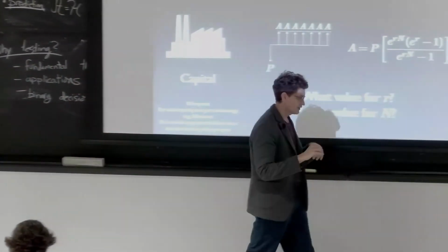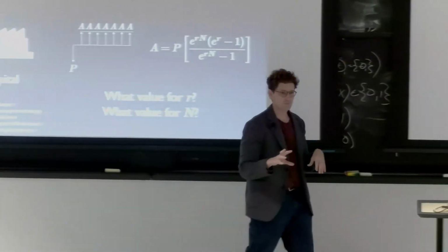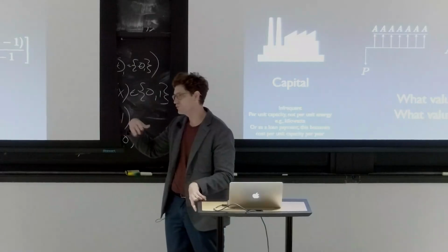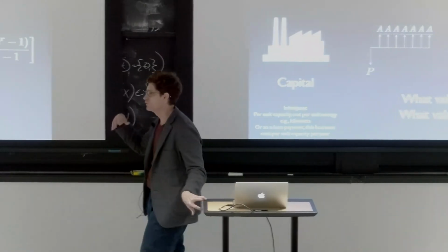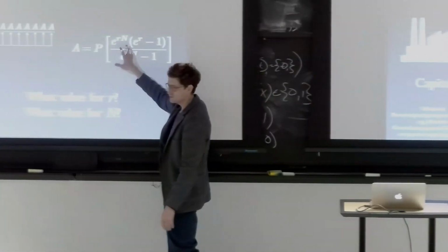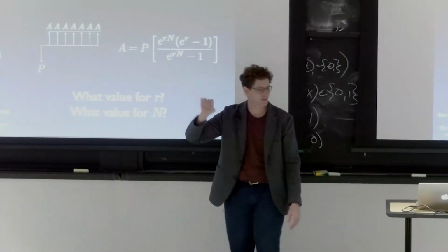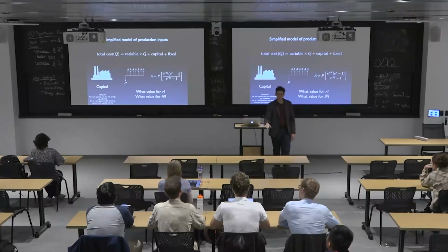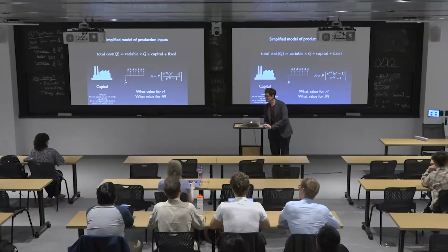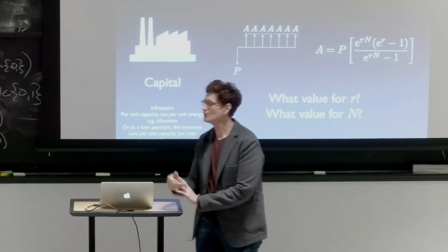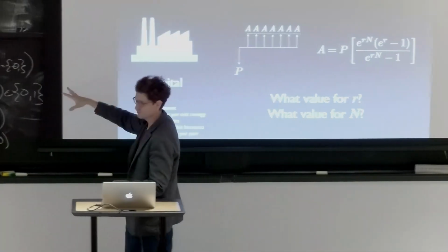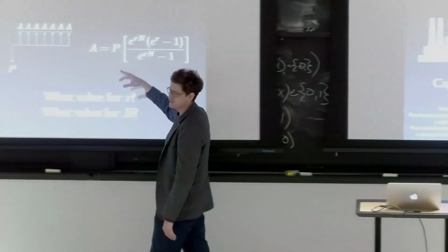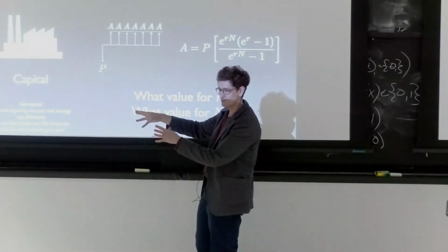What we're going to do is just treat everything in real dollars. We'll treat all future dollars as having equal value and we'll use the real interest rate. I don't think I'm being adequately clear here. Does that make sense to people? By using the real interest rate, we can ignore the effect of inflation on future revenues and just figure out what the real cost is in today's dollars and be done with it.